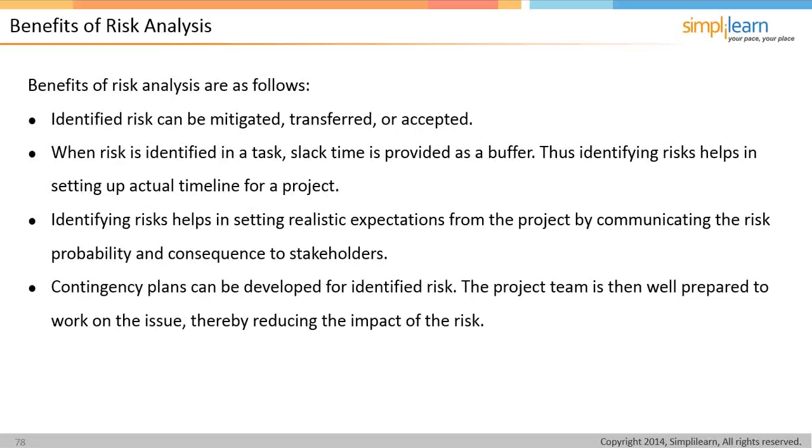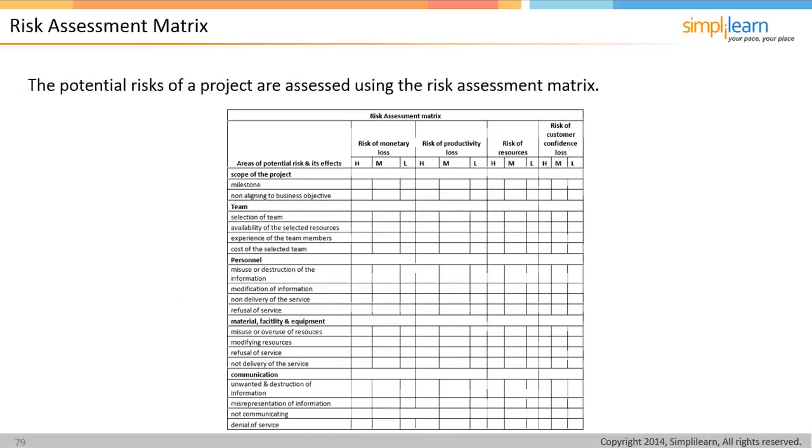If you're putting in a new computer system, you're probably not going to have a light switch event where you shut down your old system and turn on your new system and hope it all works, because the risk is that if the new system doesn't turn on and operate properly, your business could be shut down for some period of time. So you might say, to mitigate that risk, we're willing to have the two systems operate at the same time. So there's overlap, so we can make sure that the new system is operating as anticipated and as expected. And once that's been determined, then we can turn off the old machine, but not until that's taken place. So that might be an example of something you might do.